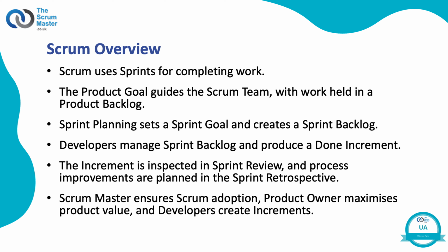Here, they set a sprint goal that is the single objective for the sprint and explains why the team is completing the work. The work to be done and a plan of how to do it are captured in the sprint backlog. The developers are accountable for this artifact.